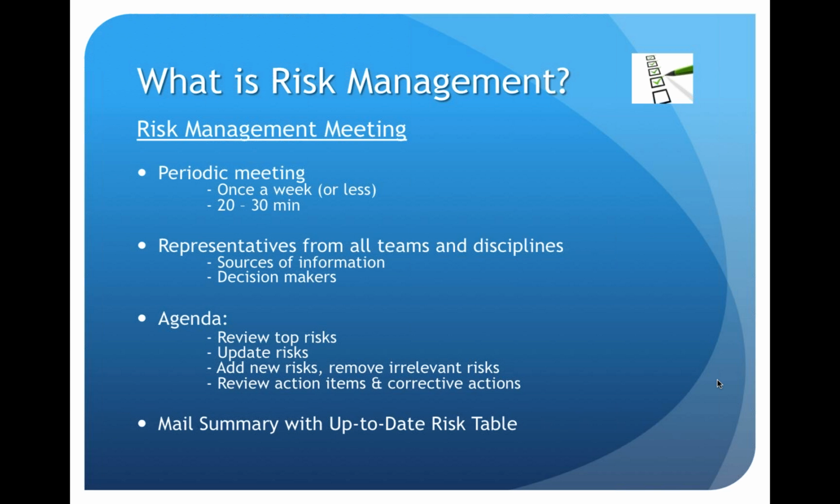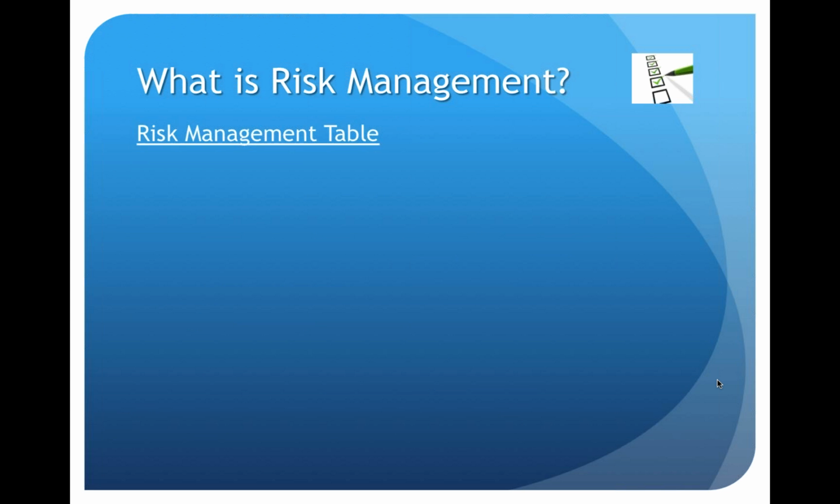Now, I talked about a risk table a couple of times already, so let's start by defining what it is. The risk table is either a virtual table or something very concrete that you can share with everyone in the team, containing very concrete information. It's going to have, obviously, the name and a short description of your risk. For example, high instability in a specific area of the product that we were not building upon, or key people from the team leaving the company, or it taking more time than we thought to deliver this feature. Those are the risks that you should have in there.